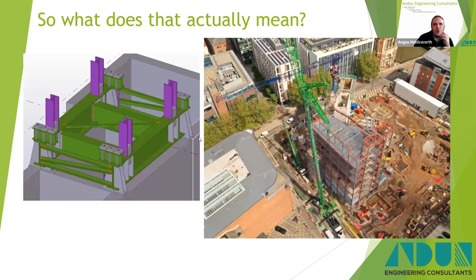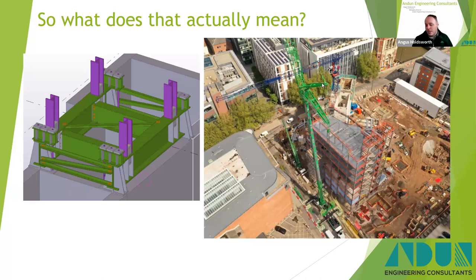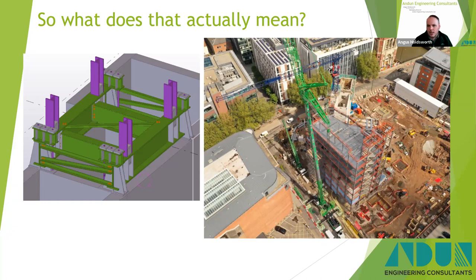There were L-walls at the back to bring the piling platform up to the correct level, and the general sequencing of the work — an awful lot of temporary works went into what was quite a small site. On the more impressive stuff: tower crane grillages. Not only is there the design of the steelwork, there's the design of the anchors into the concrete, the effect of the temporary works on the permanent core. Probably 30–40% of the time we end up doing the core assessment as well, considering both the core and the tower crane. The construction sequence becomes very important — understanding what happens when: if the core goes up in isolation and the tower crane goes on top, that's a different load case to when the core is up and the building is tied to it.